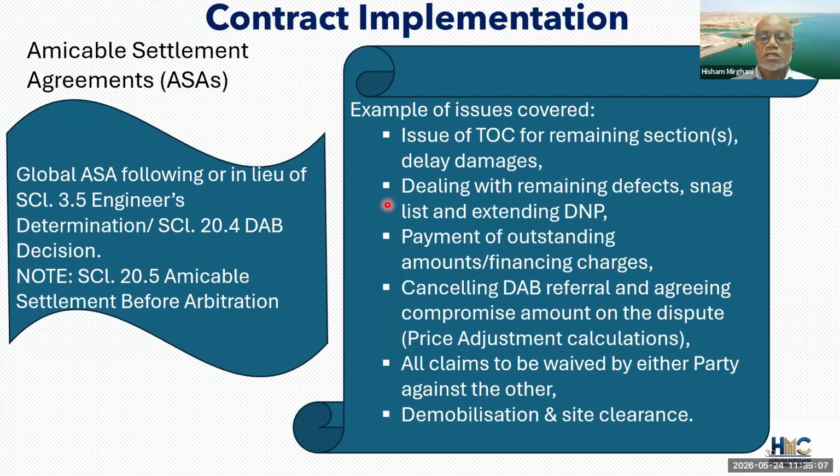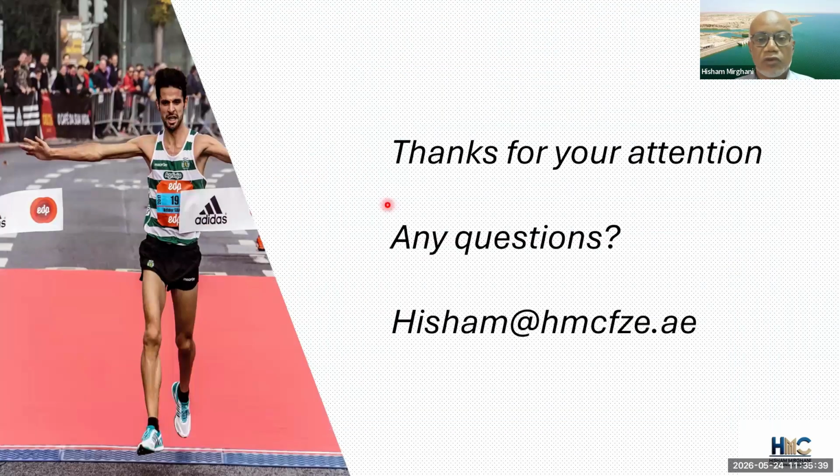Even on a DAB decision, sometimes the contractor compromised on decisions that were in his favor, but we managed to get substantial reductions in return for waiving the delay damages. And sometimes a DAB referral by the contractor would also be cancelled. Basically, all claims waived by either party as a financial settlement. And with this spirit, the contract could be completed with the minimum of disputes. So I think I've crossed the finishing line, and